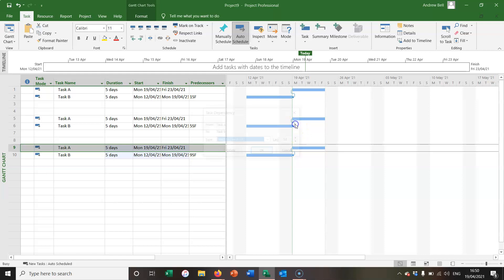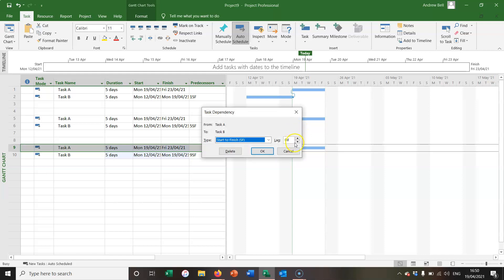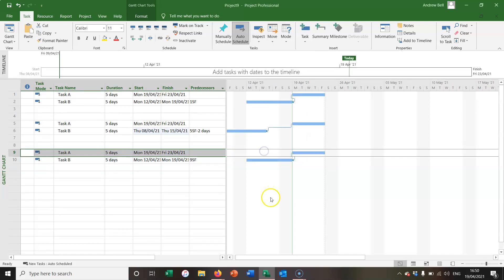If I double click the arrow, I'm going to put two days of lead time in, which is minus two days of lag, and that puts a further gap between the tasks.